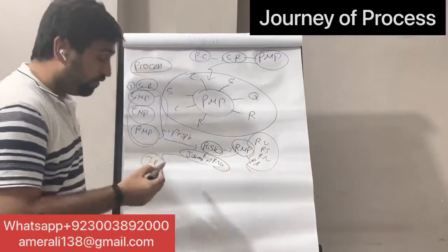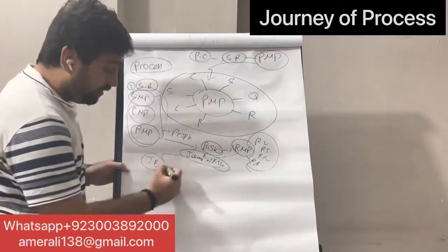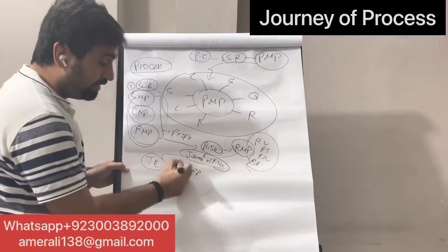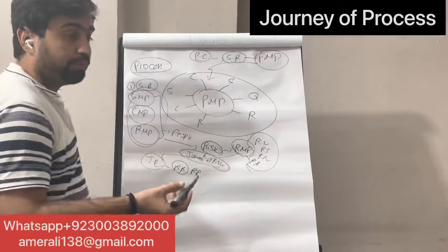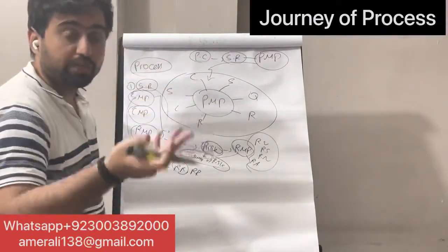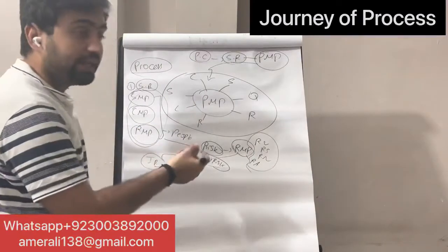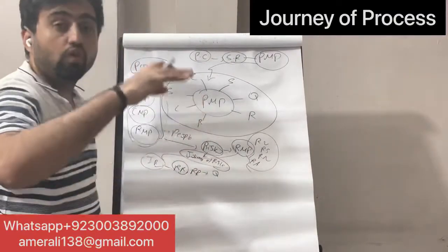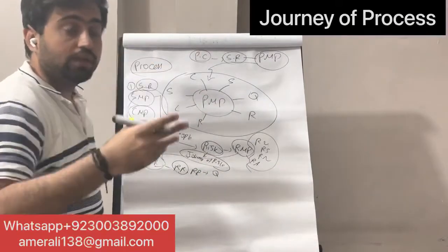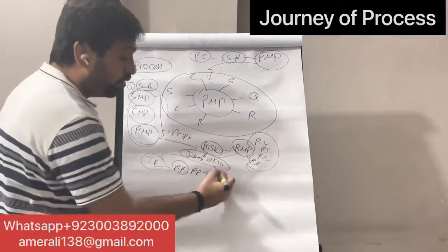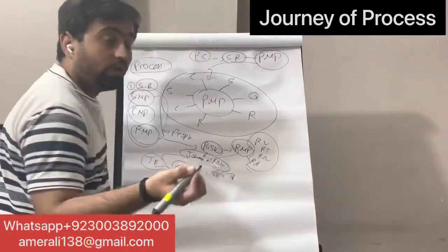Watch Journey of Risk, identify the risks, and put all the risks in the risk register, and you get the risk report. The risk register is for throughout the project, while the risk report is only for that particular meeting. Once all the risks are in the risk register, you rank them first qualitatively: low, medium, high. Then if you need it quantitatively, giving a number to the risk, you go to the quantitative analysis.